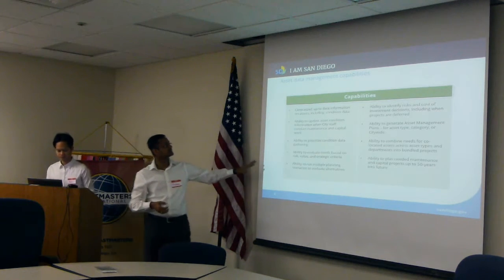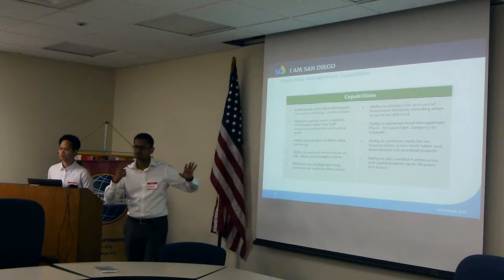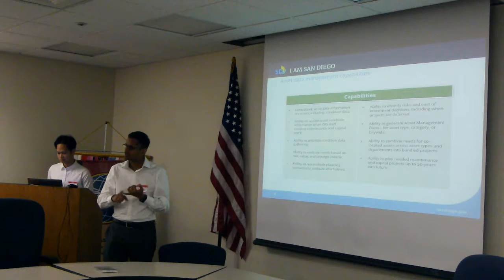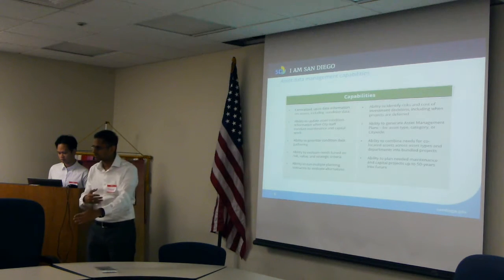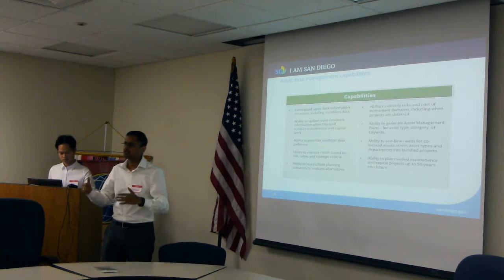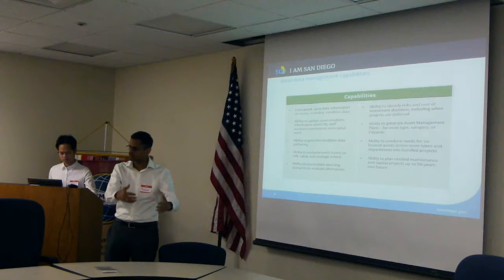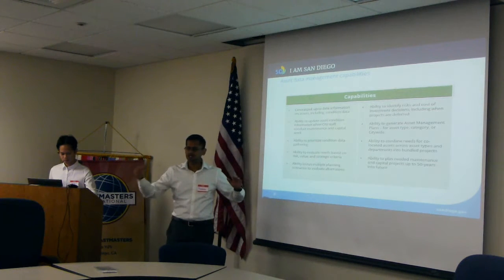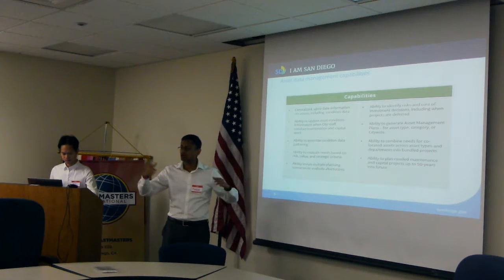Moving on, I said we also feed data into Riva, which is the asset data management capability, where we need to know what asset it is, where the asset lies, how it is performing, the current data, and what the life cycle of it is. Is it at the end of its life cycle, even though the asset is behaving well or is at its optimum? Is it nearing its lifespan where we could anticipate some trouble in future, for which we've got to plan a replacement next year? So all such information, like we discussed, needs to be fed back into Riva for us to get a new project, or for it to propose a new project.